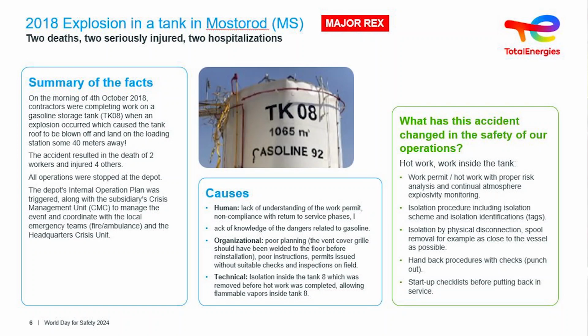Then the technical isolation, which was the major problem or the immediate cause: the isolation process was not properly followed. They were supposed to blind flange outside the tank, but they blind flanged inside the tank, which you can't even see. Someone can easily miss that. So, of course, there's a lot to learn from that if you go deeper.